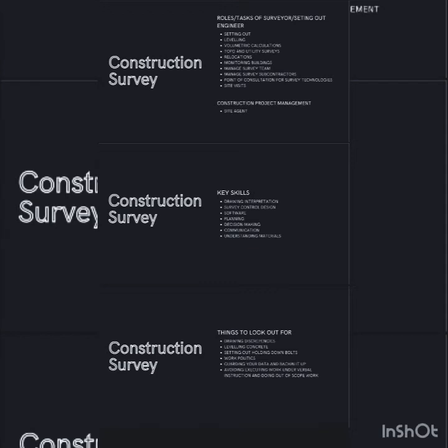There's also topographical maps and utility maps. Let's say you get onto a new site. You do a topographical map of what's there, and then you do a utility map. Let's say underground services of everything that's on that site, so that when people commence with the work, they know what's where. For example, you have cases of electrical cables.